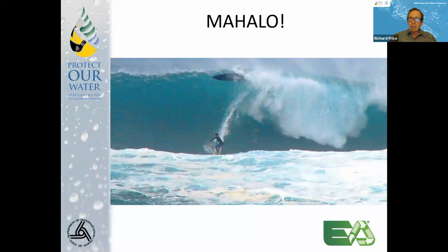The liability does go back on the owner. And in states like Maryland and Virginia, where they actually include the erosion and sediment control plans in the design, the owner then puts it back on the designer.